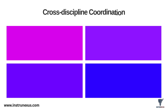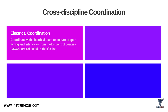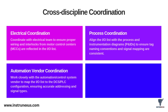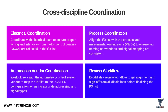The IO List is not created in a vacuum. It is a central document that demands constant cross-discipline coordination. You must coordinate with the electrical team, who are responsible for the motor control centres (MCCs), ensuring all wiring and interlocks from the MCCs are correctly reflected in the IO List. You must coordinate with the process team to ensure the IO List perfectly matches the P&IDs, both for tag names and intended function. And you must work closely with the automation vendor – the DCS or PLC supplier – who needs this list to configure their system, mapping the list to the final DCS configuration and ensuring every address and signal type is correct. You must establish a formal review workflow to get alignment and sign-off from all these teams.